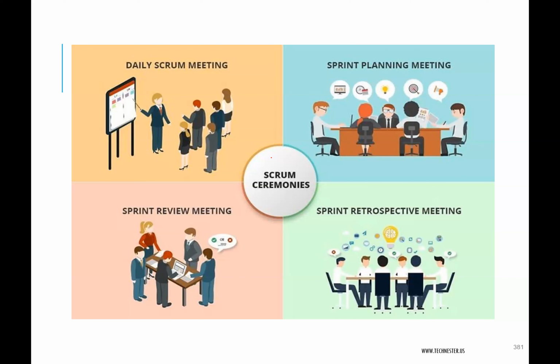And what happens in that meeting is sort of an alignment meeting where they all meet together to, I don't want to use the word groom, to refine the backlog, to look at what items should be prioritized, what items are no longer needed in the product backlog, right? So they use that as an opportunity to look at what's up with our product backlog and even start prioritizing for the next sprint. So that in the sprint planning meeting for the next sprint on that Monday,